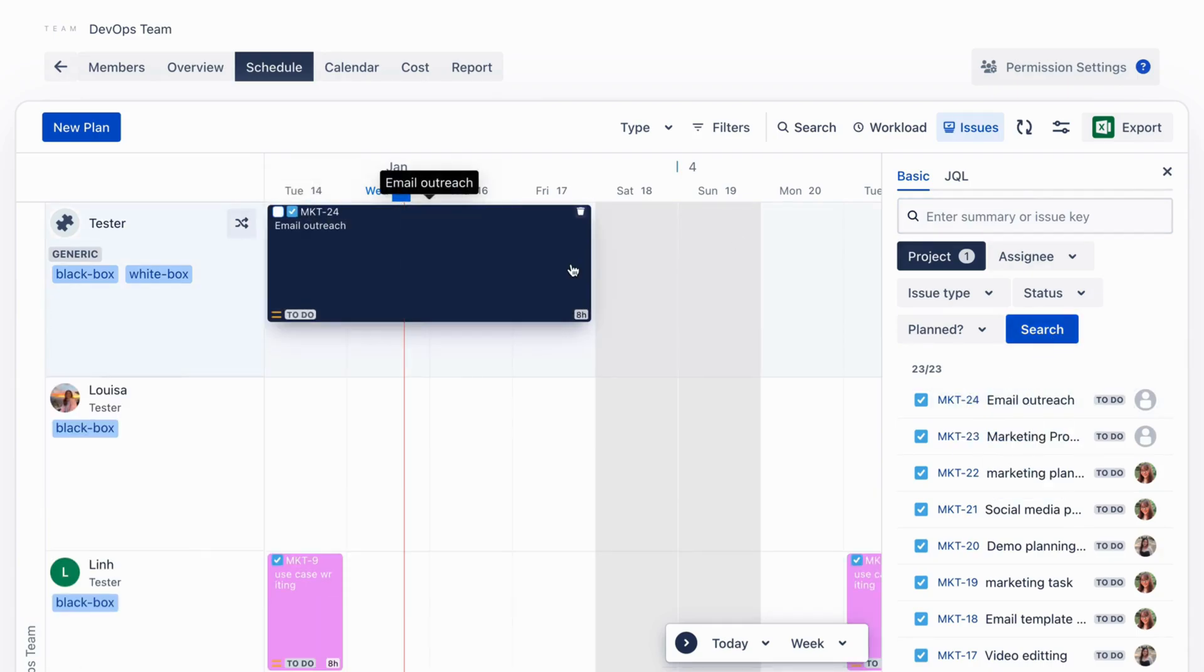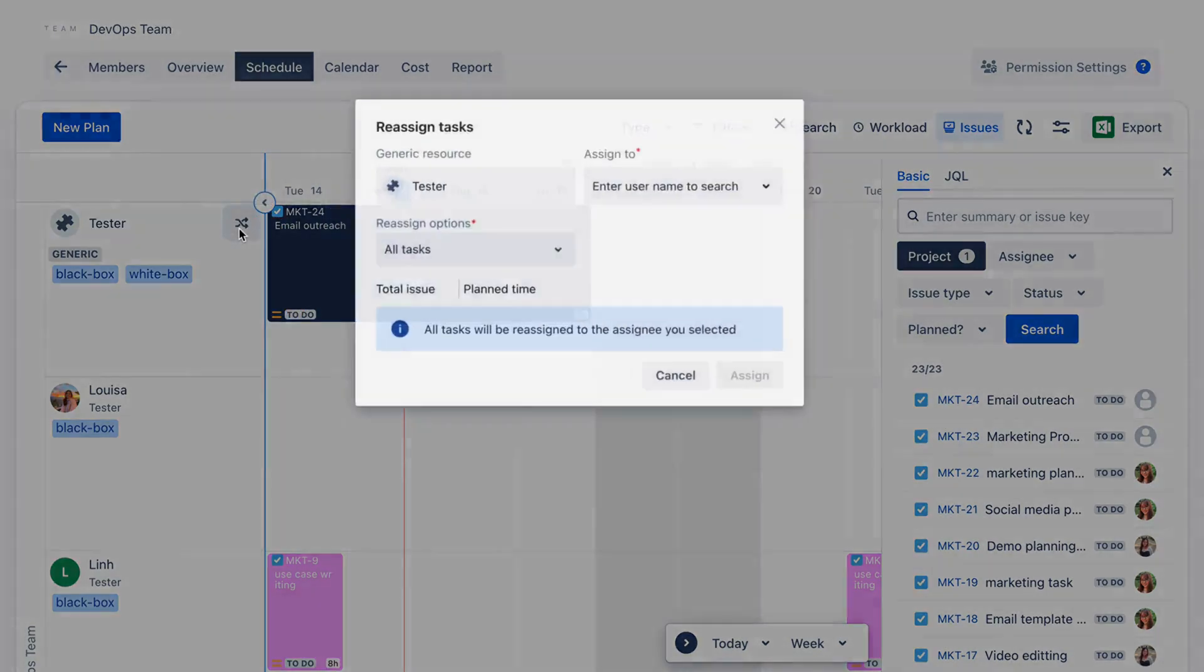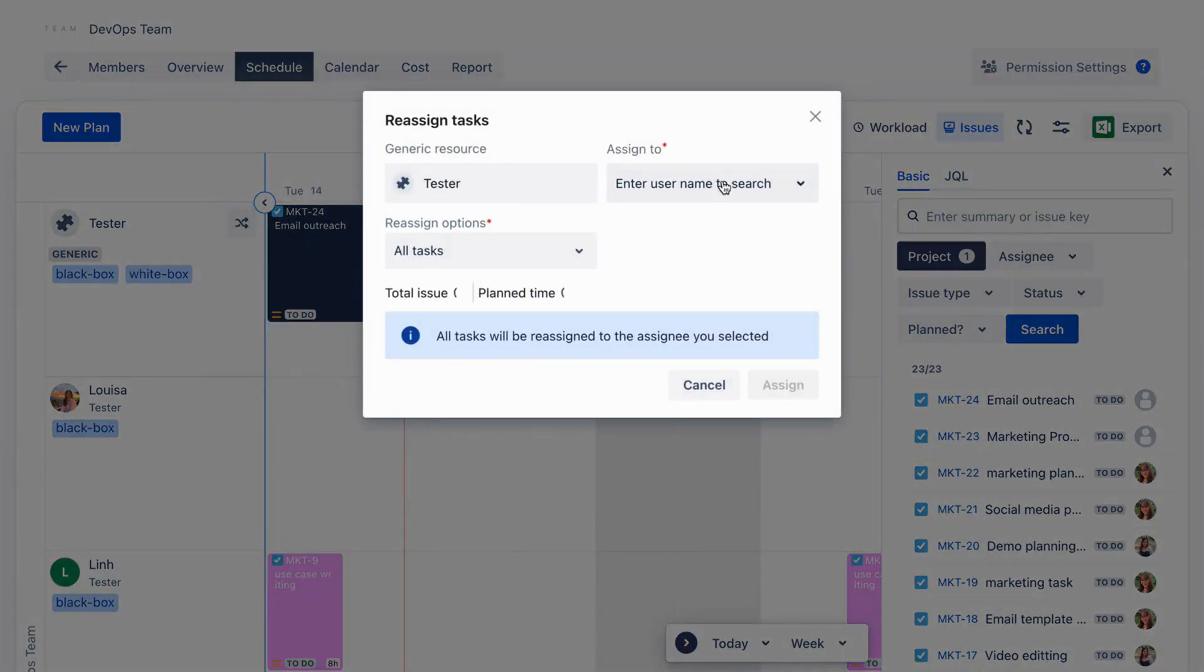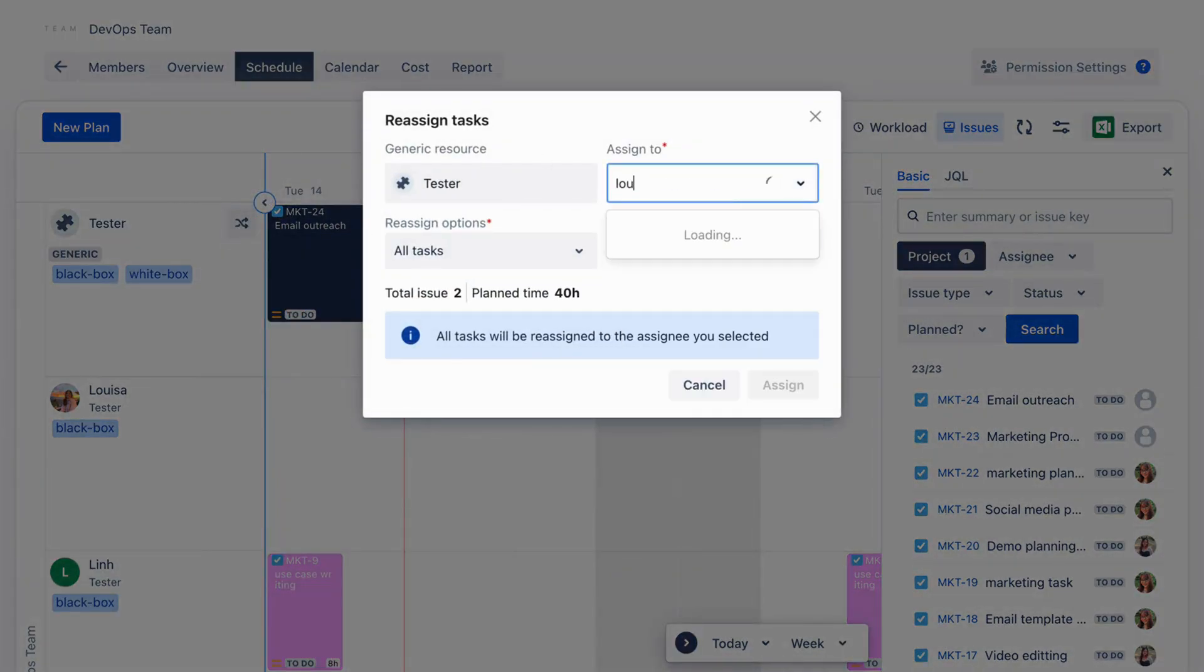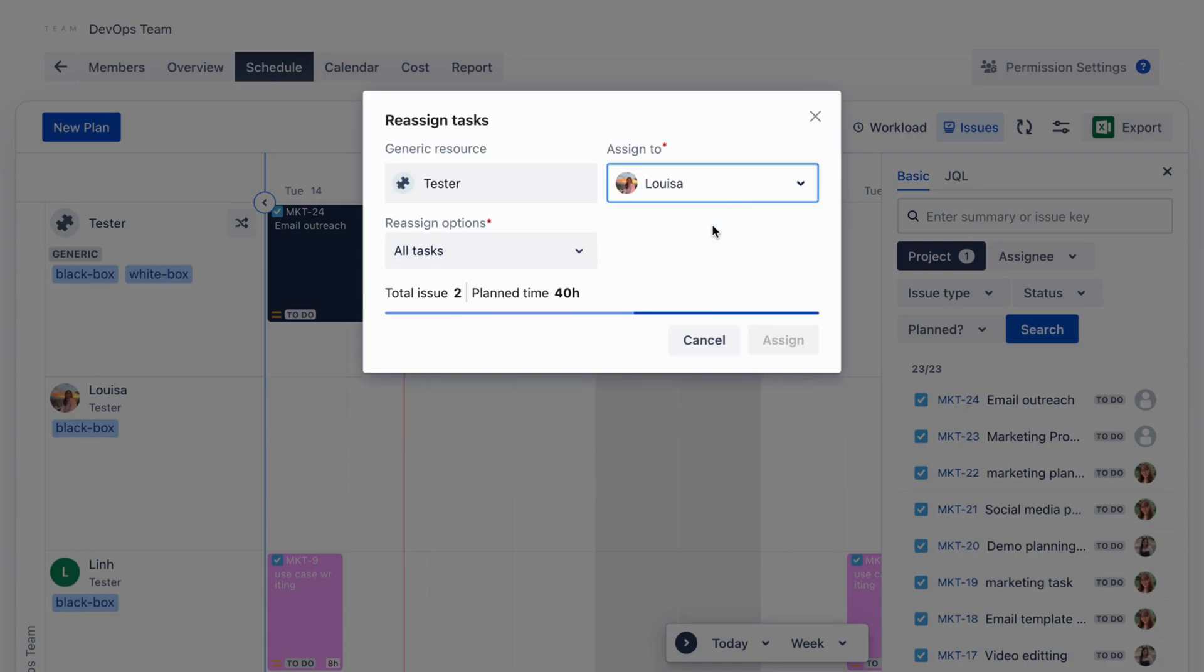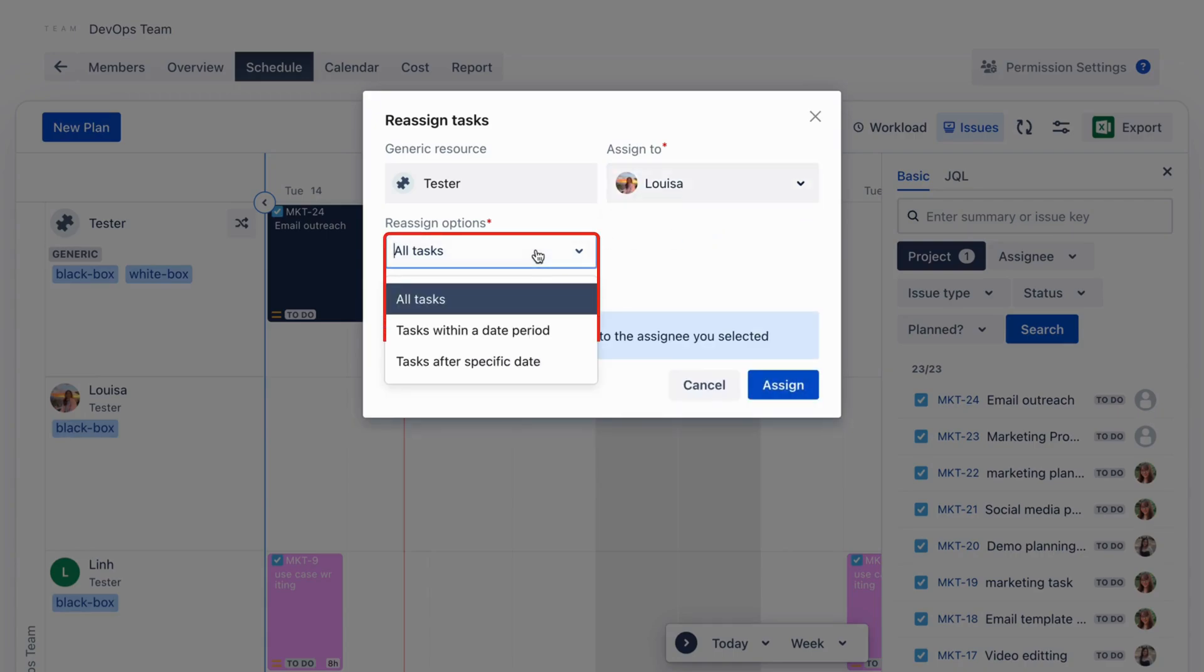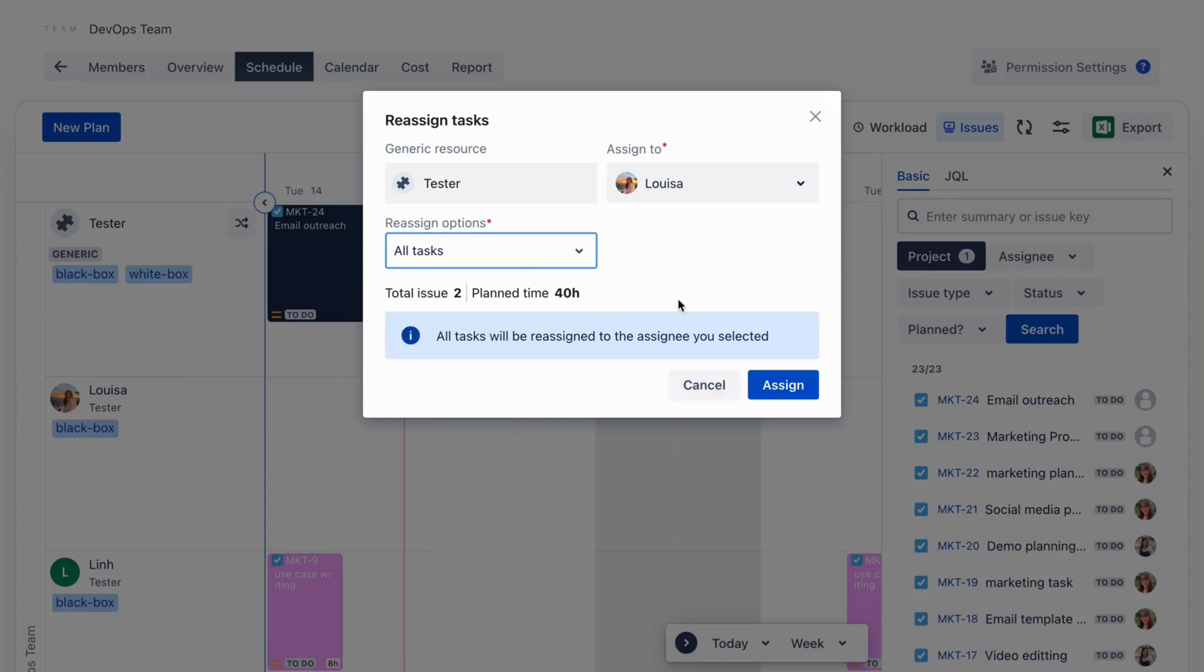When an actual resource is identified, click the Replace icon here to reassign it for another member. You can reassign all planned tasks or tasks within a specific timeframe to the team member. This ensures a smooth transition without disrupting task schedules.